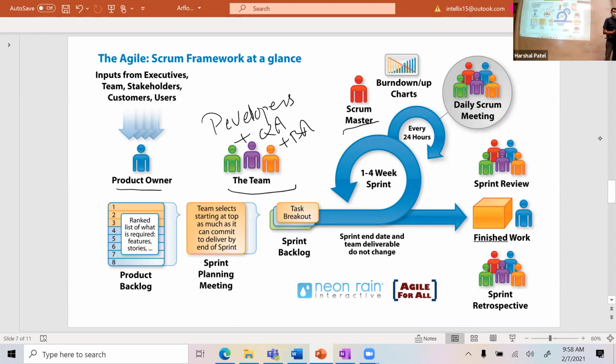Requirement wise, the product owner is responsible for maintaining the product backlog items. What is the product backlog? These are all the requirements that I want to have implemented in the software. Backlog is nothing but a requirement. So for example, area manager can create RFREP user. That could be one backlog item. Area manager can create a different kind of user. That could be a second backlog item. But it's a running list of all the items. So you usually have 2.1, 2.2, 2.3, everything you can dump as a backlog item, technically.